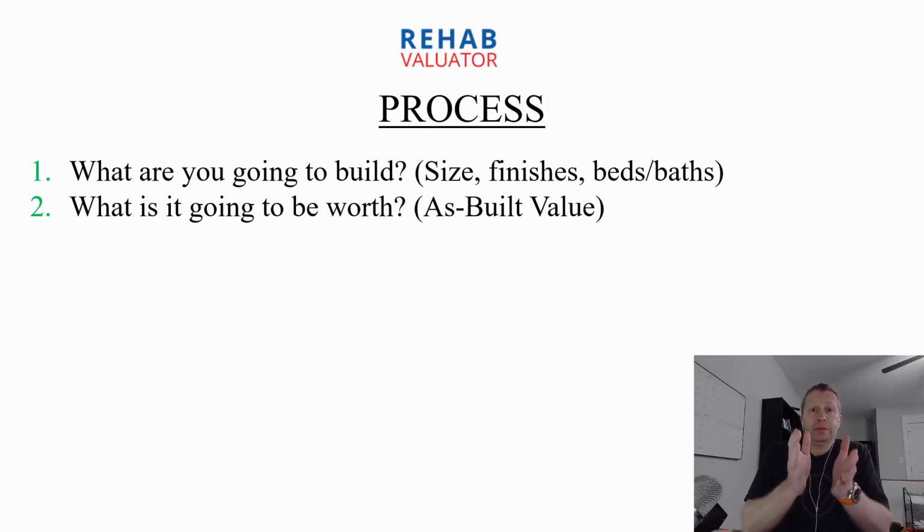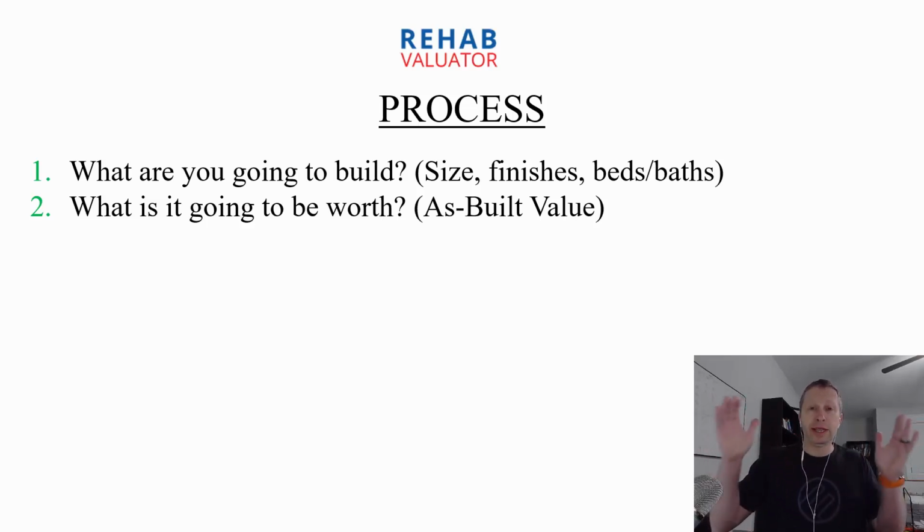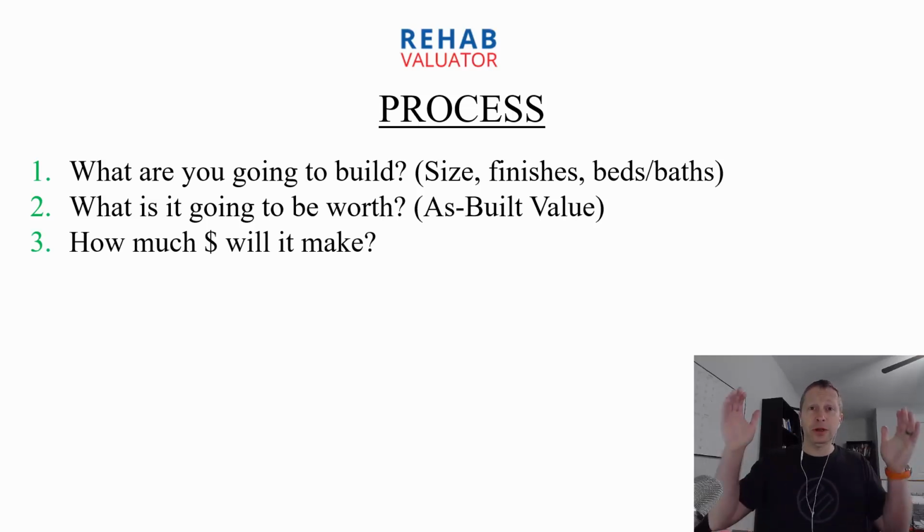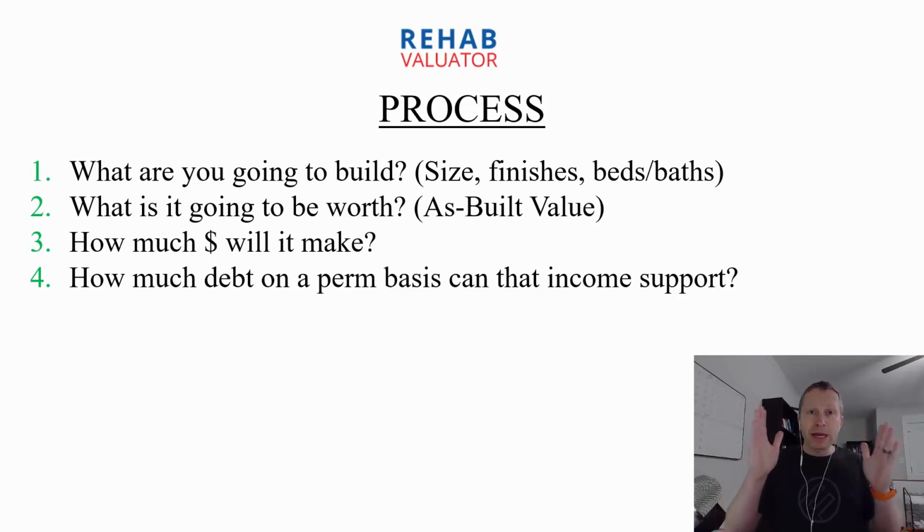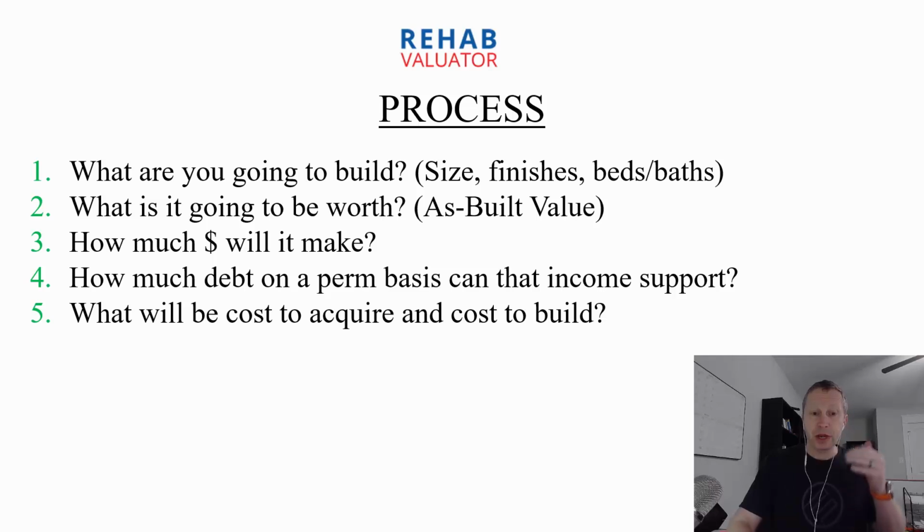Step number 2. Now that you know what you're going to build, what is it going to be worth? What is the final as-built value of what you're going to build? Very simple, right? Now that you know what you're going to build and its value, how much money is it going to make when it's built and leased out? Now that you know how much money it's going to make, you can determine how much debt that income can support. So now you know on a permanent basis, when the property is built and rented, how much debt it can support. From there, you back out your cost to acquire the land and cost to build.